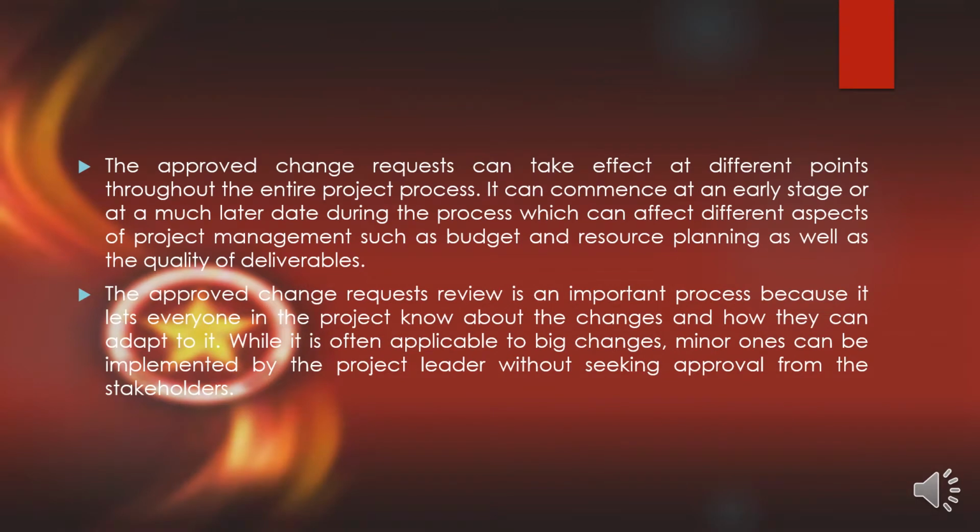The approved change request review is an important process because it lets everyone in the project know about the changes and how they can adapt to them. While it is often applicable to big changes, minor ones can be implemented by the project leader without seeking approval from the stakeholders.